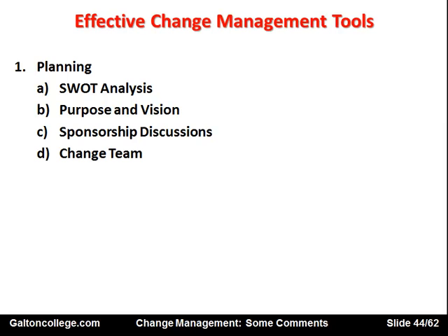So the change team, that needs to be picked, and it needs to be picked in a way that the change team agree. It's easy to pick because people want to be on the change team, they want to be involved. And try and get a wide dispersion of opinion on the team, not all from one department. Try to get outsiders. So if it's change within the marketing department, get people off the shop floor to participate. Get people from production, get people from HR to participate.